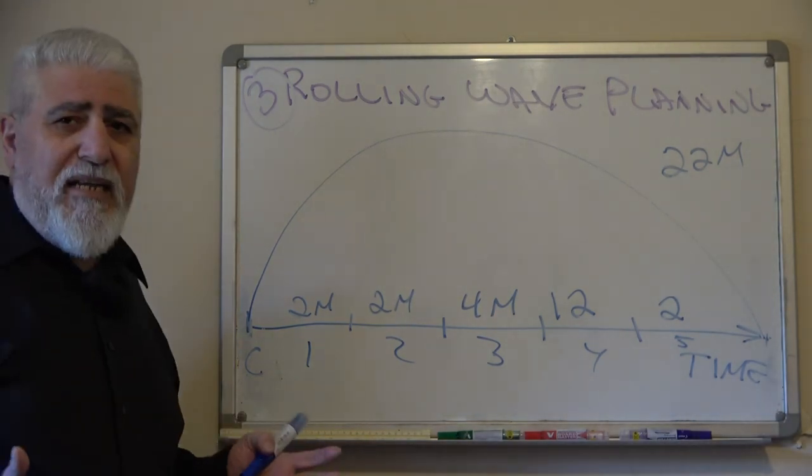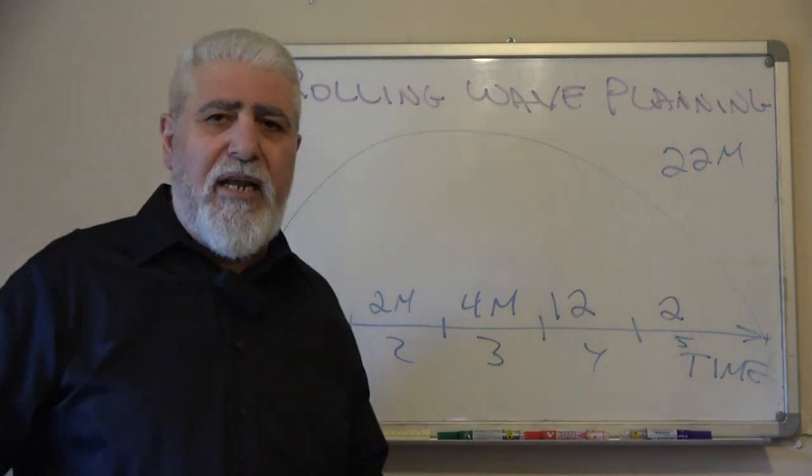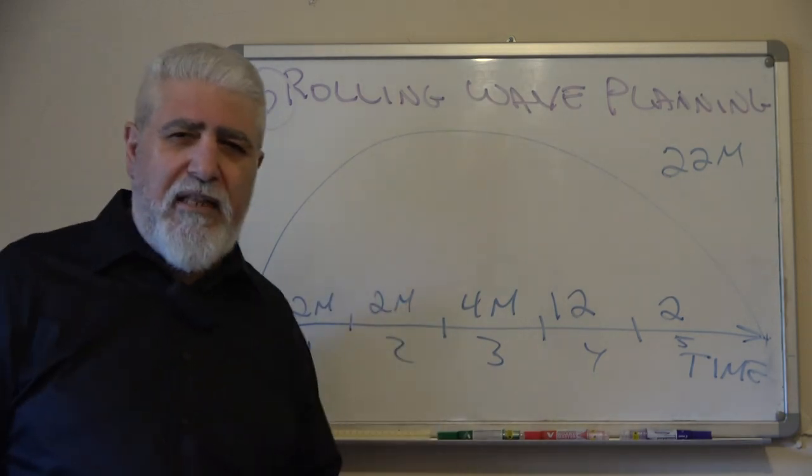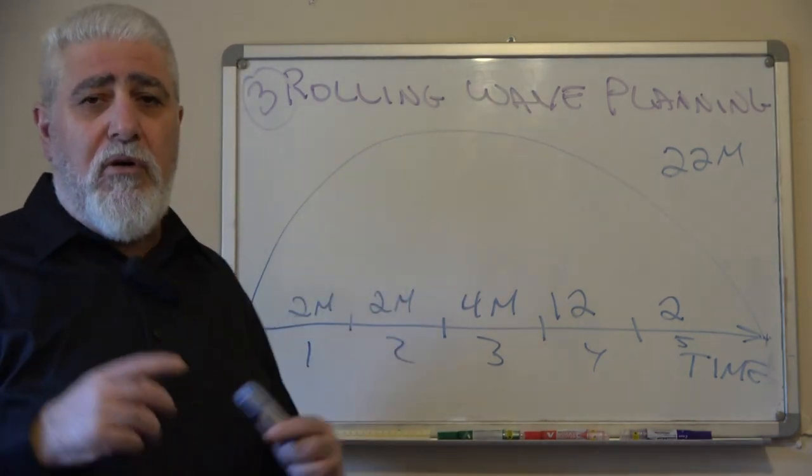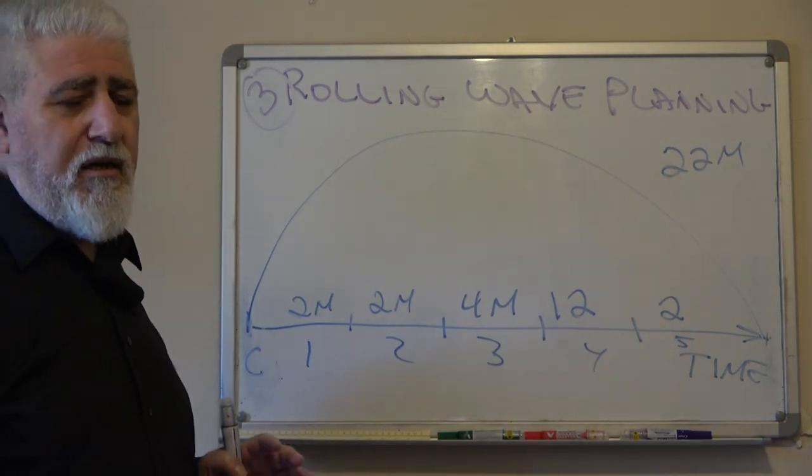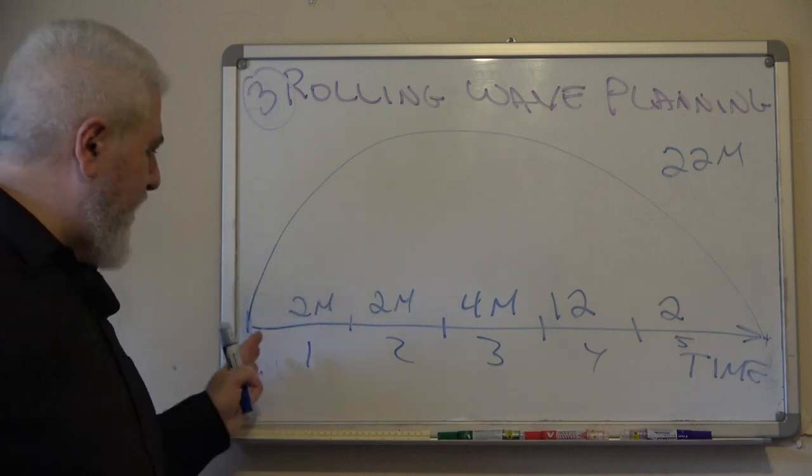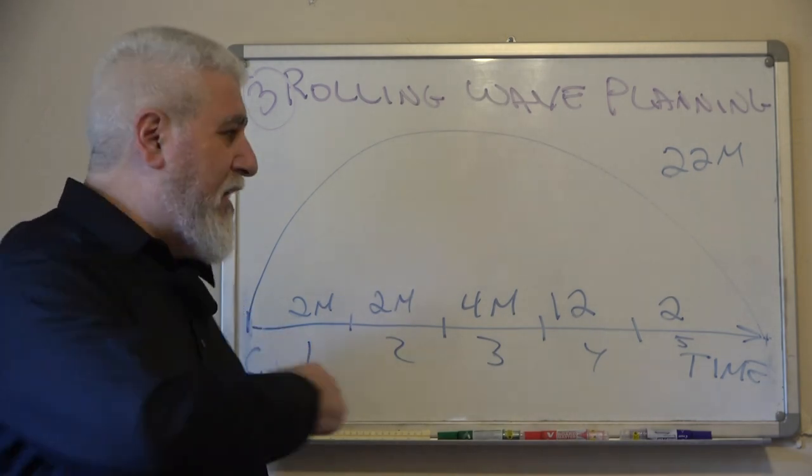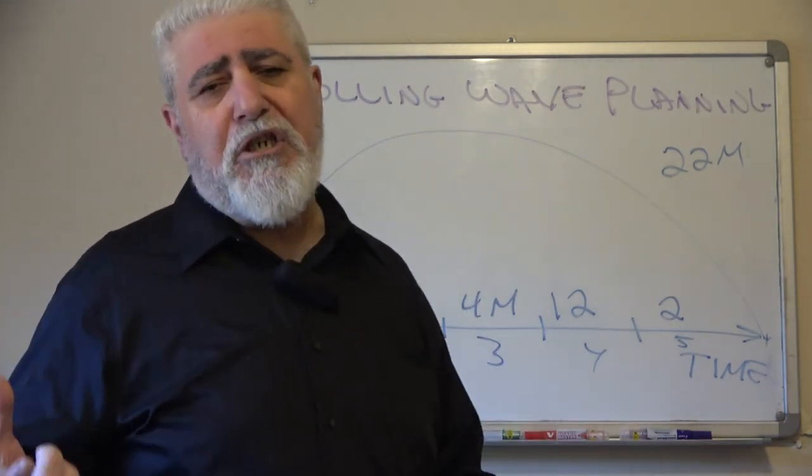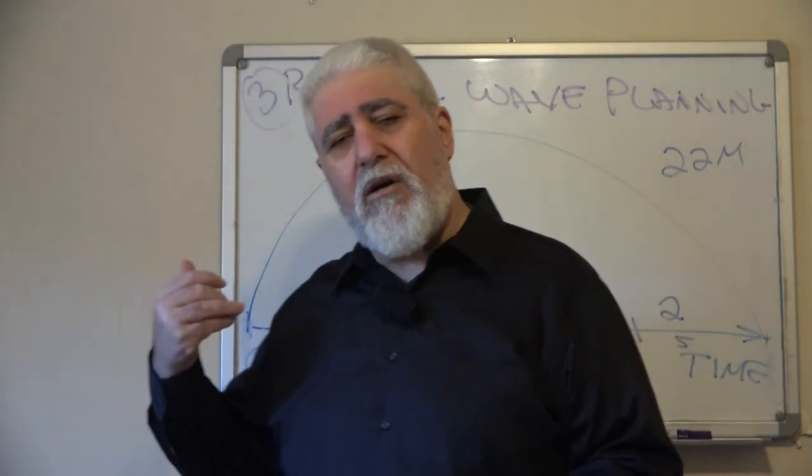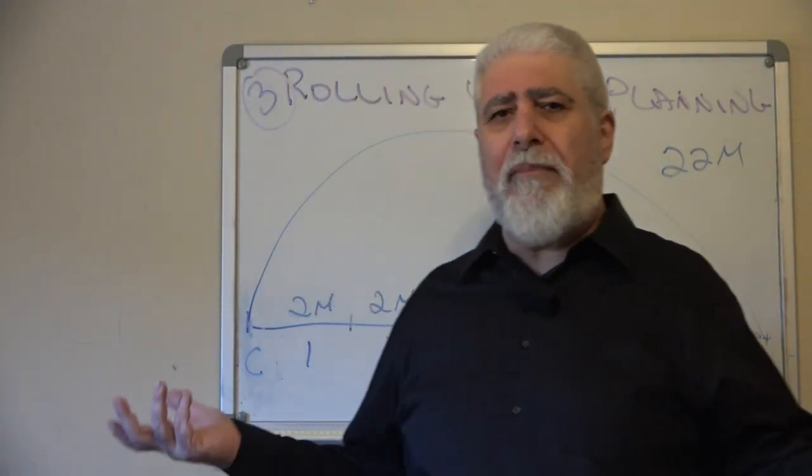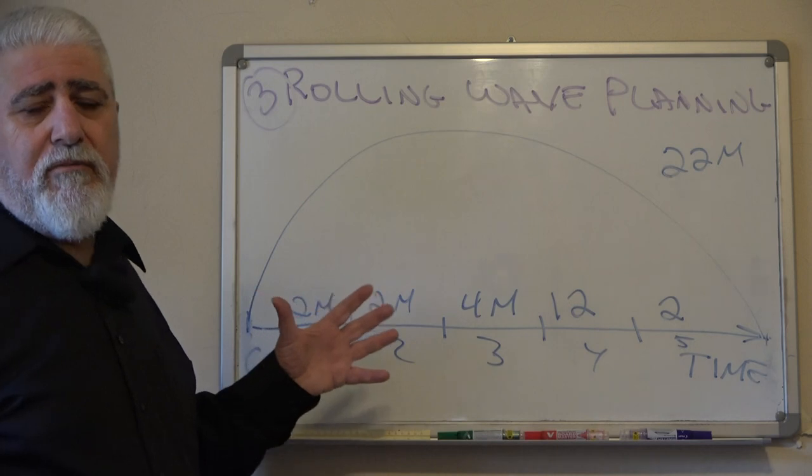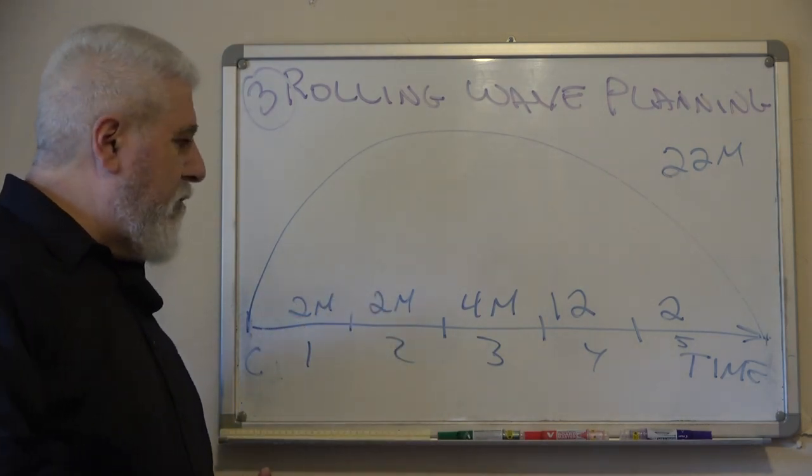So my guess, roughly of course, I'm just throwing a number in here to demonstrate a concept and obviously I chose 12 months here because that's probably the implementation stage which is the largest stage and the one that requires the most significant effort. So I might have an idea, I need to start to plan. I might have certain key dates I want to plot them on the schedule. So the answer to the question is that definitely I'll start in this case but notice I don't have much detail. All I have is rough duration, how many phases and the approximate duration for each phase.